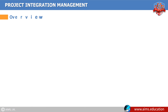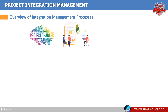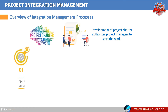Overview of integration management processes. For any new project, the first thing is the development of the project charter. This document authorizes project managers to start the work. After this, the following integration management processes come into action. First process: the project management plan is developed, which is the most important document. It guides you about everything that is going to happen on the project.